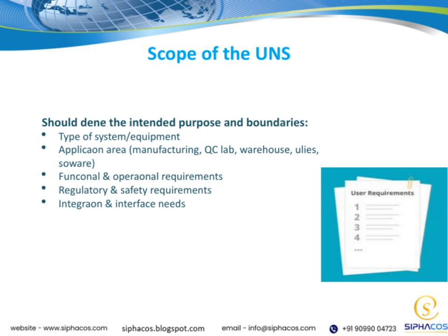Ensuring this compliance is critical for legal, safety, and quality reasons. Another key point is the integration and interface needs. How will this system connect with other systems or equipment? Defining interface requirements early on helps facilitate smooth integration and avoids future compatibility issues.